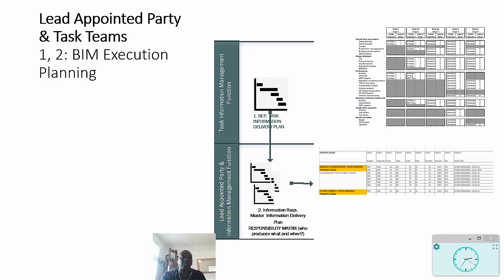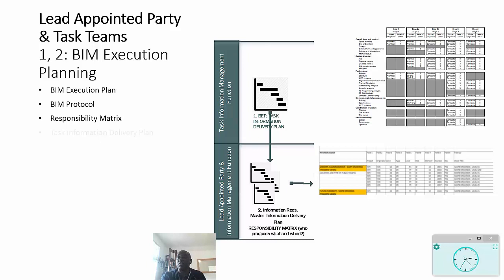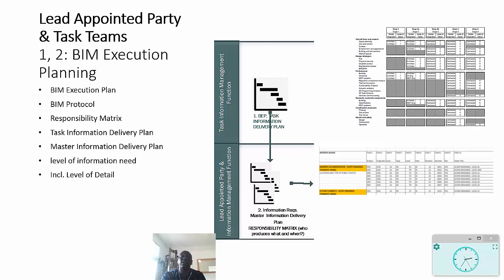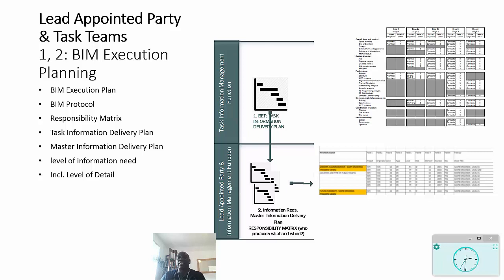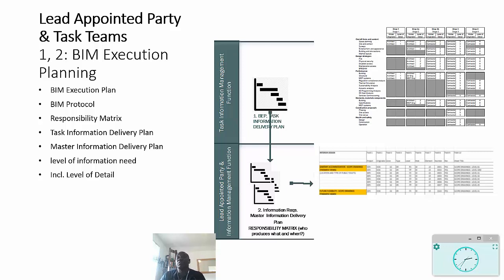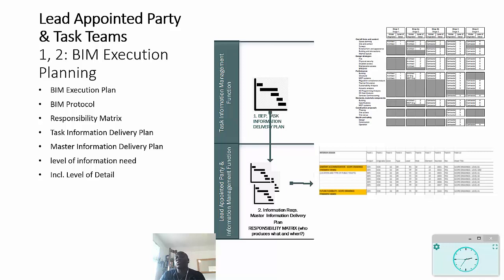Now the key part of the first stage of this process is BIM execution planning. A number of things they do there: there is obviously the BIM execution plan itself, there is the BIM protocol which gives you the legal framework for sharing information and for controlling access to intellectual property, there is the responsibility matrix which says who does what, and there's a task information delivery plan which is required of all the task teams, which gives a schedule saying what they will produce.